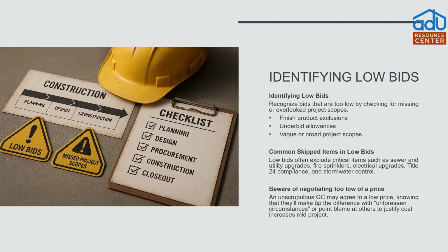And beware of over negotiating. Sometimes it might be a particular skill that you have, how you can negotiate really well and squeeze down a price on a contractor. The worst thing that can happen is they say yes. What happens if a contractor says yes to a low price? Well, they're going to have to figure out how they're going to be able to get it done for that price. And they might bring in some lower cost trades or start taking away things that you didn't know you were supposed to have or were going to have if you were paying the full amount.